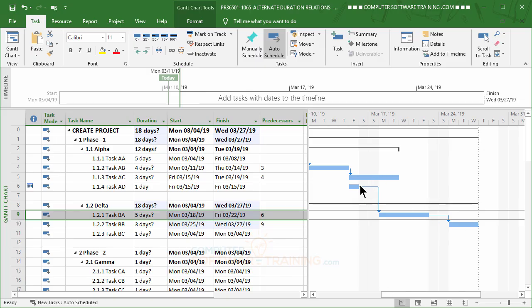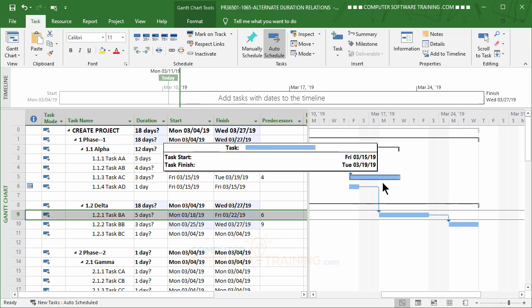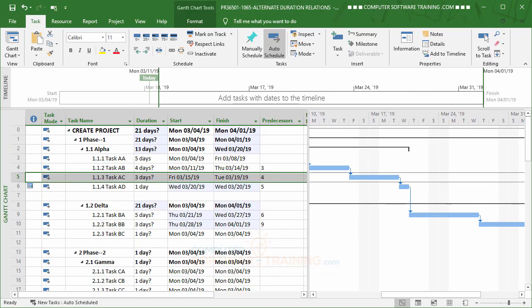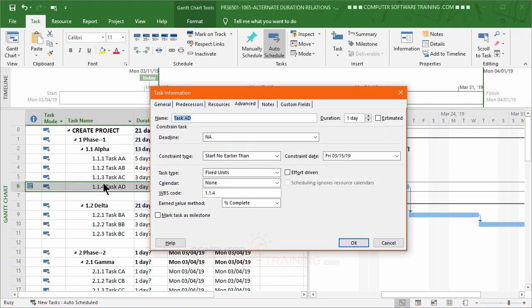So now in this next one here, again, if I go ahead and, oop, let me do that there. Go here, and I link it to there now, watch. See, it pulls over. And that's okay going that way because it has a start note earlier then. So as long as it's not going backwards, before 3:15, then we're going to be okay. So again, it's probably a good idea to get rid of the constraint on that. So we'll just do a double click on it, and we'll make it ASAP.